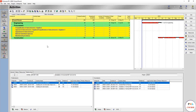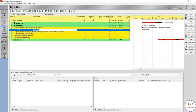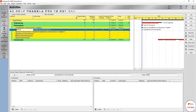Now let's start adding activities. We'll assume the porcelain tiles and ceramic tiles come from two different sources. The porcelain tiles will be from a subcontractor who does manufacturing and installation. The ceramic tiles will be from a supplier, and we will install them using our own labor. For the porcelain tile subcontractor, we add a pre-qualification activity — the process of sourcing and getting the best price according to specifications. We can name it with ID prefix 1000 or 'PROC Architectural'. We'll give it 12 days.